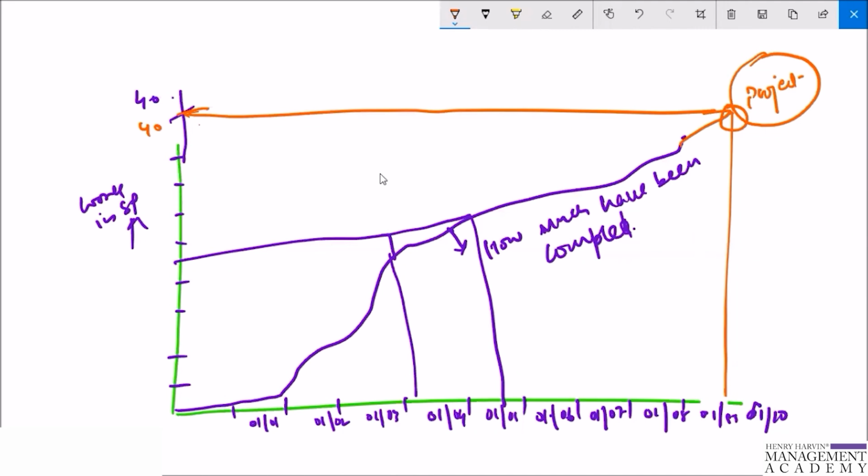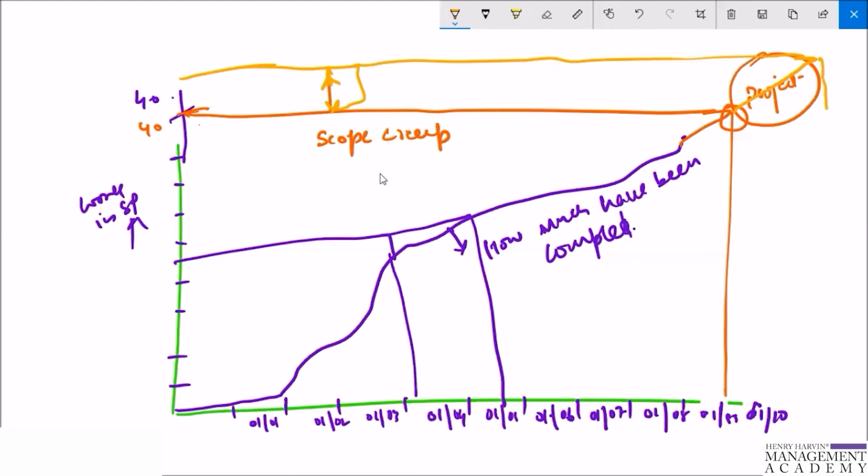But the important factor here is that if there is any scope creep, say some amount of work is added, the normal line will come to this, and let's draw it in a different color. If there is an addition of, suppose, 5 story points, this scope line will go up like this. Now in order to complete this work, the progress line has to reach this way, and we can know at which point the work is going to complete. The change of date will happen here. This is how we can track the sprint burn up chart, or maybe the release burn up chart.